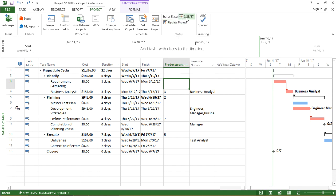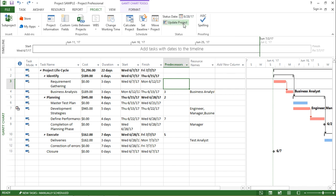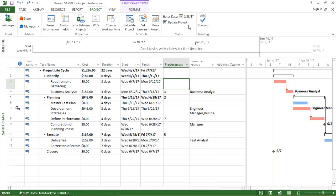Now before I move to update project, let me tell you about status date. Status date is that date on which I have to update this particular project. So it is just a reminder for us that on this particular date I have to mark the completion of project or I have to mark the update of my project.